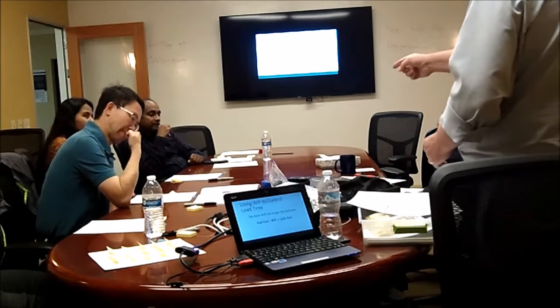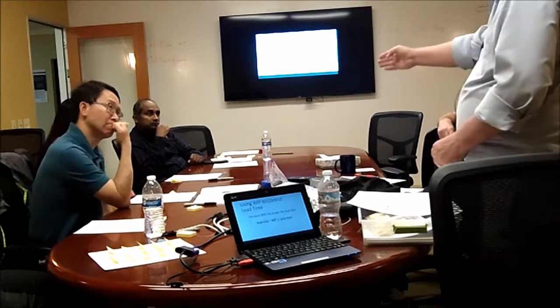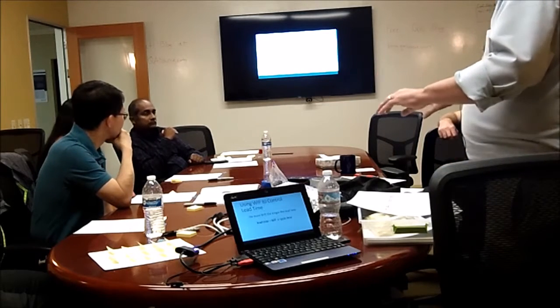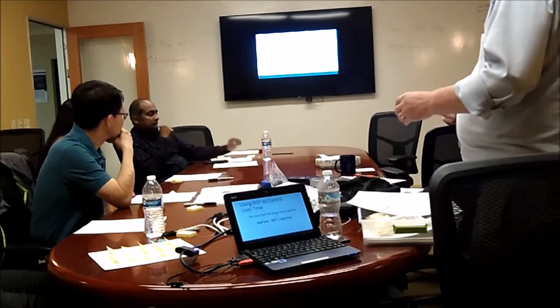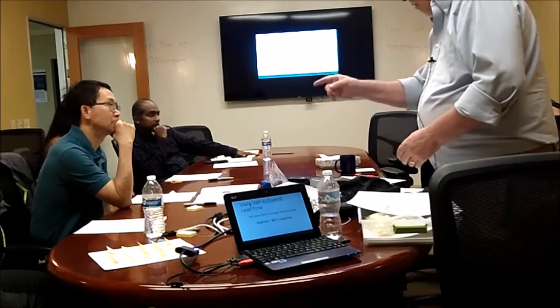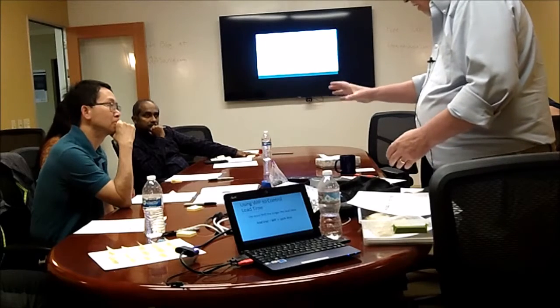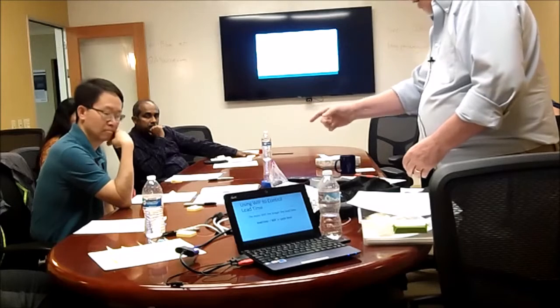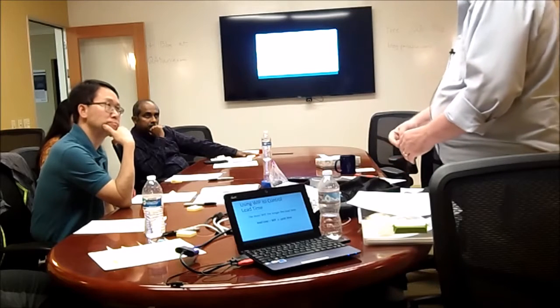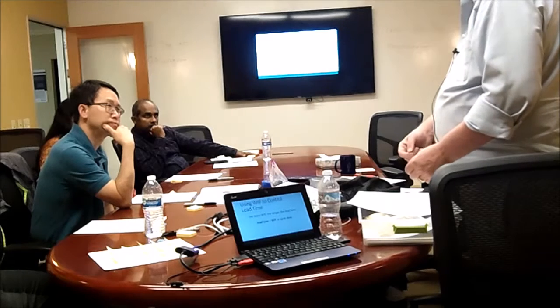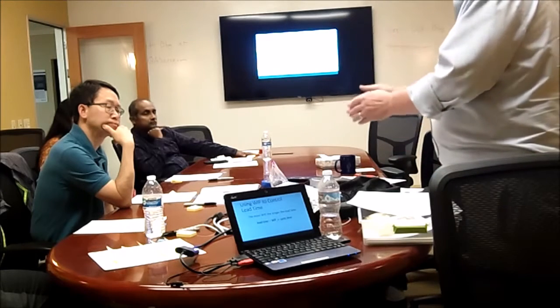So these calculations are assuming starting at the backlog. But if you were running a development operation or some kind of process, if you had a Kanban board, you could look at any of the units and figure out how many units are in front of it, that it has to wait for, and calculate the lead time from there.